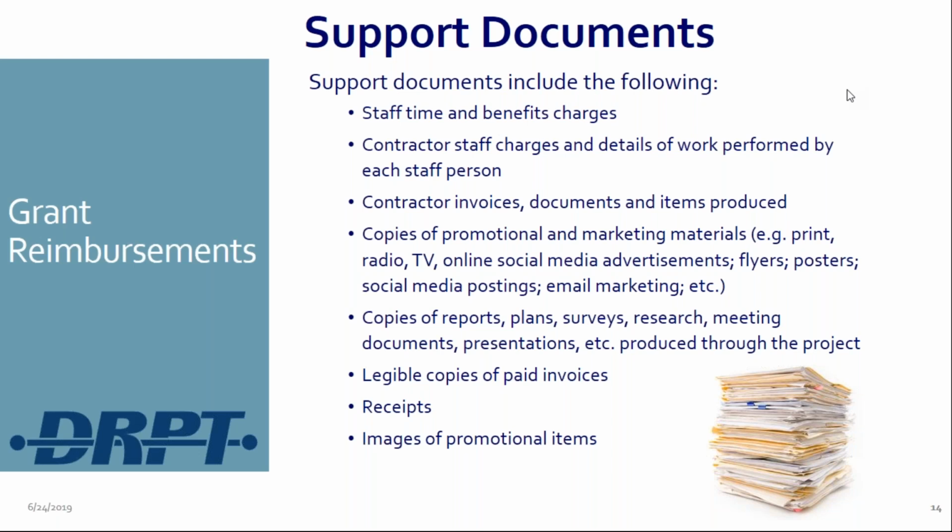Any work performed by contractors, we want to see some of their summary. Like I said, invoices, documents. If you're doing marketing and promotions, copies of those advertisements and things that you've done would be very helpful. Any reports or plans, or if you had a meeting and your contractor made a PowerPoint presentation, we would like to see all those copies too. So anything that's produced with the money from the project and you're billing for it, we want to see those documents. Everything you pay, we want to see some type of document with that, receipts.